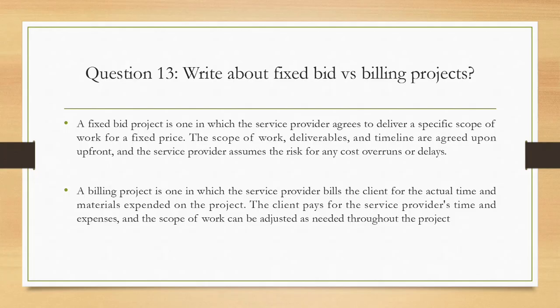And coming to this billing project, here the client, Mr. Anand, we will be thinking, will not be giving any project to another organization. He will be just using a few resources, and he will be paying those resources according to the time. For example, he hired four resources, so he just needs to pay 500 rupees per hour. They will work for 8 hours, and they will be charging 500 rupees per hour.